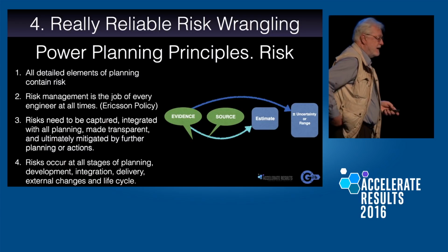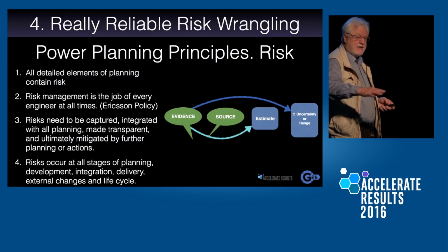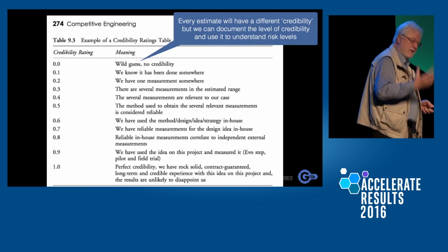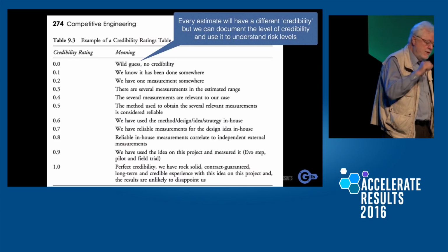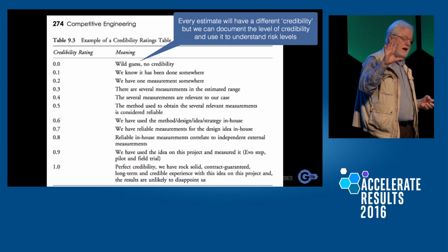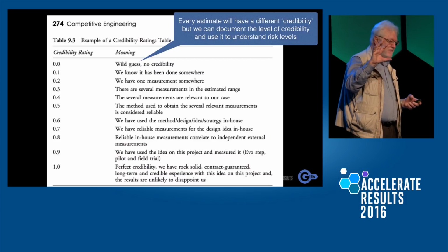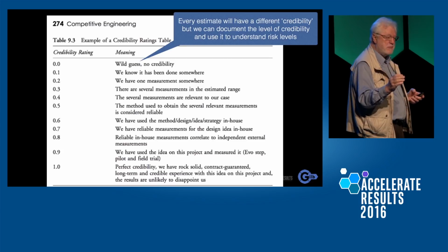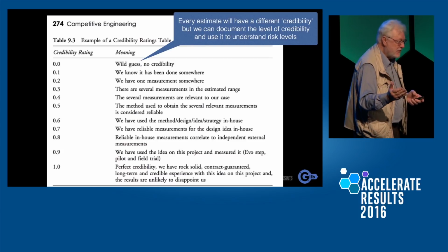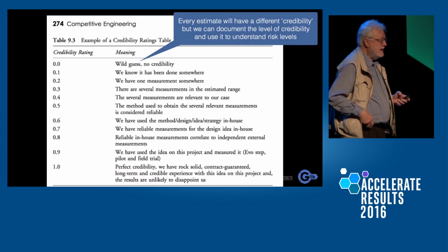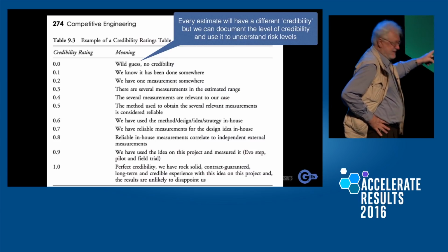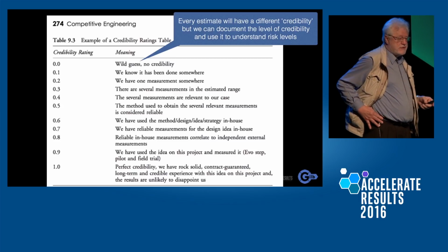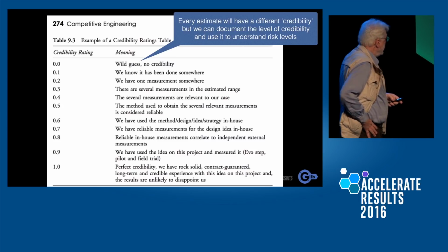Here's a simple idea. I alluded to it earlier, talking about the guy in the bar whose name you couldn't remember. When we're asking for an estimate on this table, as I said, we ask for the evidence. How did you compute 23.3? And the source. Was it a scientific paper or a person or something like that? Or are you just making a guess personally? And based on that, we rate every one of those 100 estimates on a scale. This is something we developed for Medtronic in Minnesota. And we give a score.